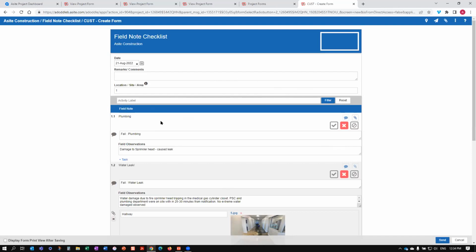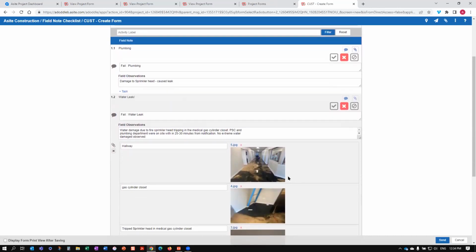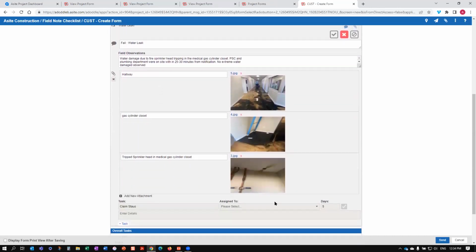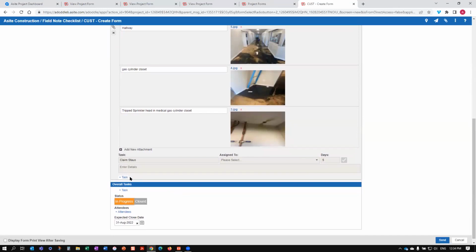I had a customer say to me one day, hey, I'm not a superintendent, but I am going out to the job and I want to record maybe we had an issue on the job, maybe we had a warranty situation. So we created this one. We could walk out to the job site, say we found the condition, put in the field observations, and then record any of the issues that had occurred, including taking photos, putting captions to them, and then most importantly, being able to associate a task for resolution.